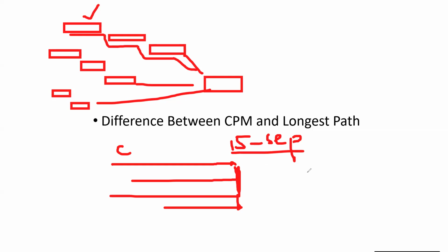At that time, we have to implement the longest path filter among these paths which are meeting or crossing this deadline. If some path is non-critical, fine, but all the other paths which are crossing or meeting this deadline will be labeled as critical. So we have to apply that filter by the option longest path. Among these, which one is the longest path? You will understand this when you practice it.